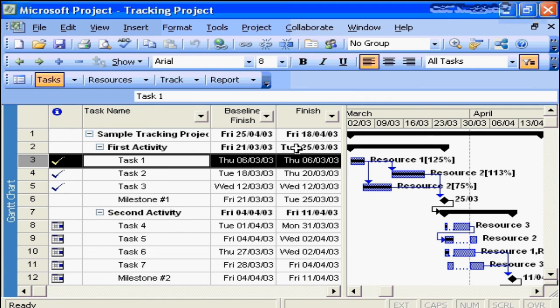Damage control is what I often refer to it as. The impact those actuals are going to have on the project finish date, and then you begin to take actions as a project manager. Can we do things? Can we change the resource loading? Can we change the dependencies? What can we do to become a little more aggressive without introducing too much risk into the project to allow us to improve the project delivery timeline, to allow us to deliver the project on time?